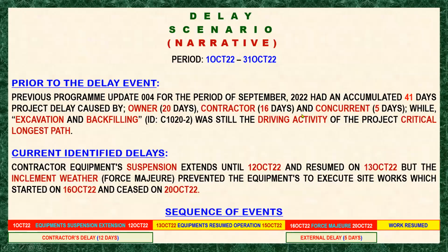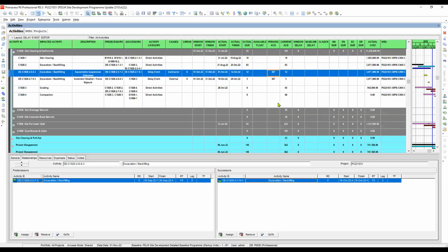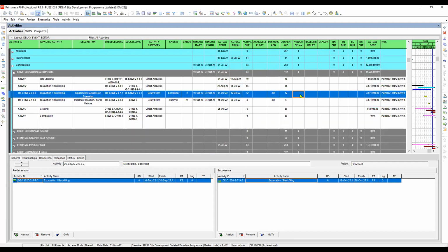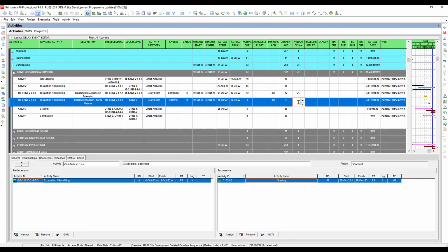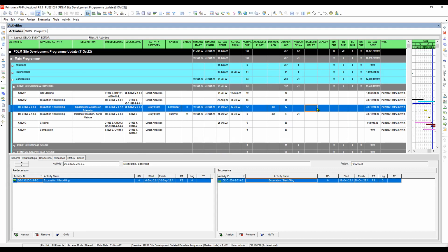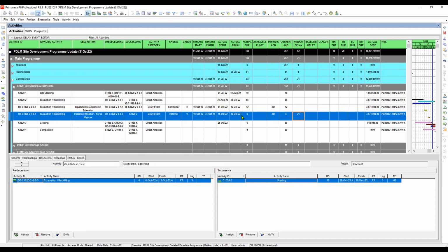Okay, so that is 367 less 346, which is 21. So that means the window delay here is 21, and also here is 21. I think we have to put this here. Only one, we will just put only one here because we are summing up for the summary.